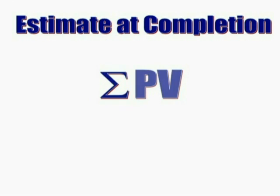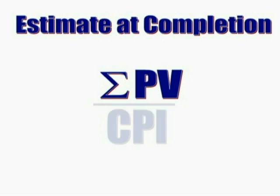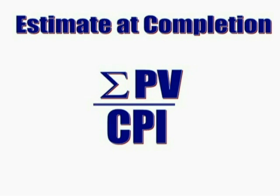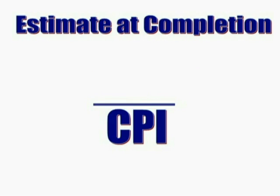You can also calculate the estimated cost of completion, or EAC, based on the current project status. EAC is the total planned value — also called the budgeted completion — divided by your current cost performance index. At any point in the project, you can calculate your CPI and divide it by your total project budget to estimate cost of completion.